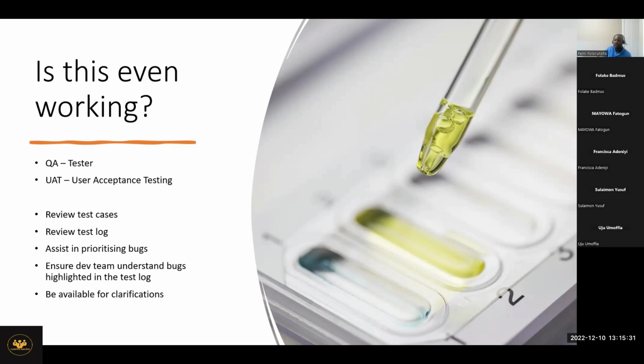So that means we have to decide what bugs we need to fix within one week and launch the application, because the implication of not launching this application is going to be a huge fine for us, right? So the BA will help in prioritizing the bugs based on the requirements analysis that he had done prior to this phase. So now prioritizing the bugs is done.